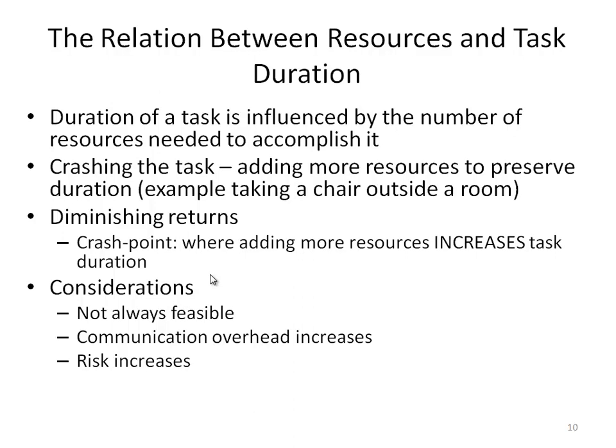Another thing that we have to consider is the communications overhead that will increase with adding more resources. Like I said, having 5 people, 6 people, instead of moving the couch, they are going to sit down and start communicating with each other. Who will do what? How can we do it? Is it going to be vertical, horizontal, and so on?